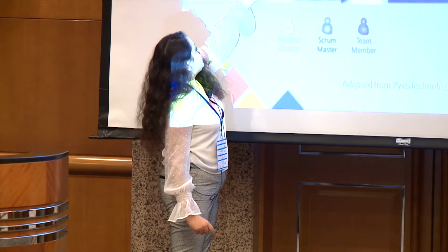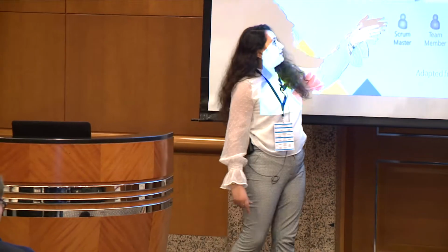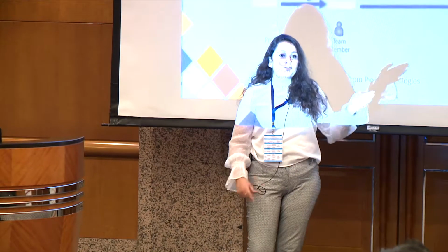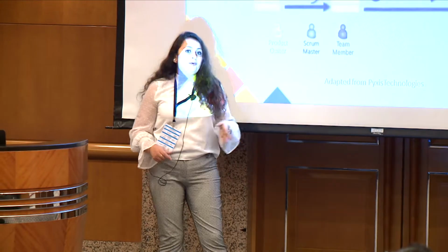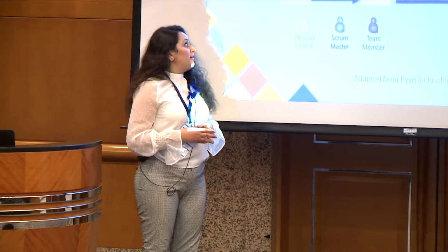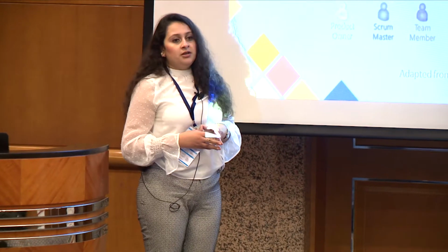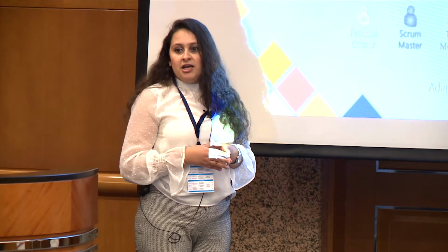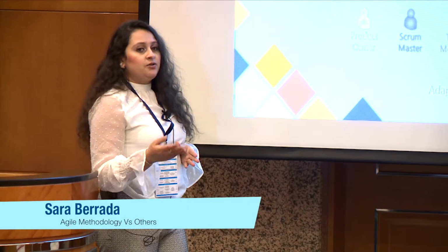He's making separate small bunches from this whole requirements. And then he gives it to the team who makes sprints, and then for every sprint backlog, they deliver it at the end so that he will have the full product by the end. And it will also make use of burn charts, burn down charts, which are a visualization of the work progress, showing where we are in the work so far, whether it is completed or not yet.